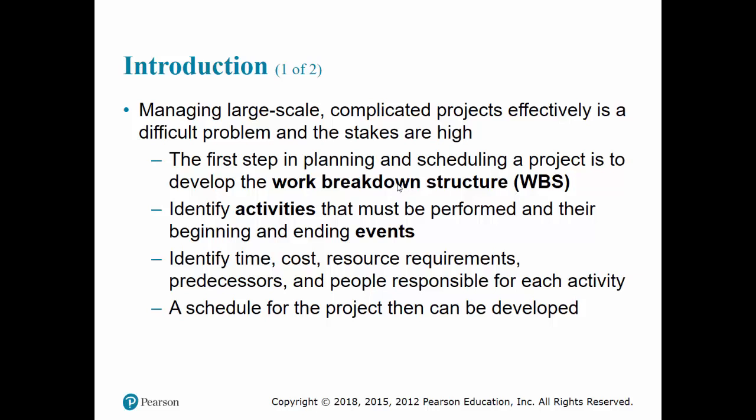And then all the resources required: technology, equipment, manpower, engineering resources, and so on. And for each of those activities, we have to determine what are the immediate predecessor activities that must be completed. So for each activity, you will identify the predecessors. Once you have all of that, we can set it up as a project network, and we can use the network to develop the schedule and the budget, etc.